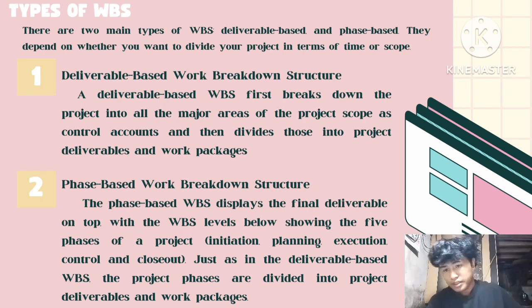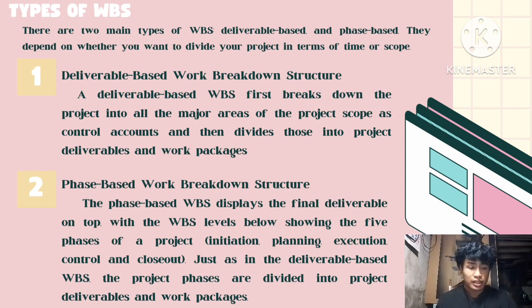First is the deliverable-based work breakdown structure. Deliverable-based first breaks down the project into all the major areas of project scope as control accounts, and then divides those into project deliverables and work packages.